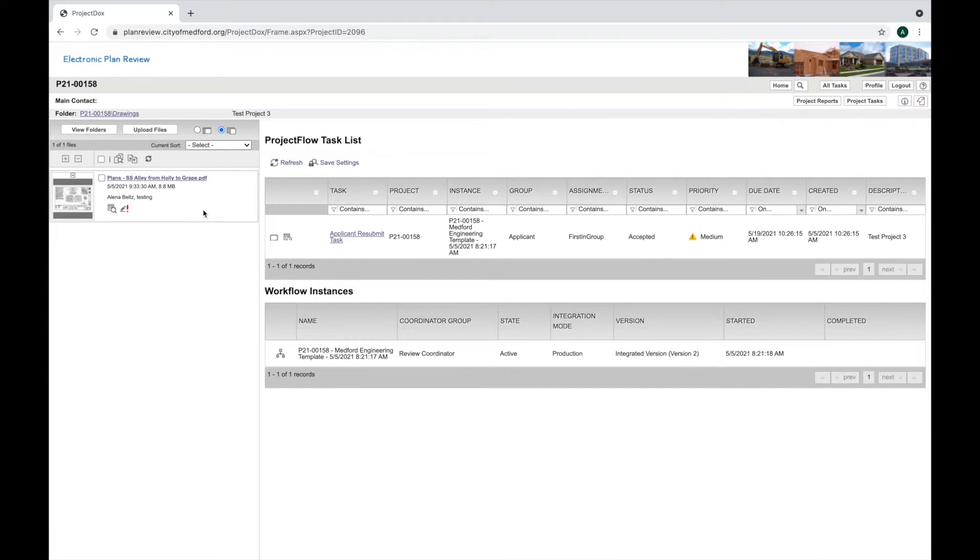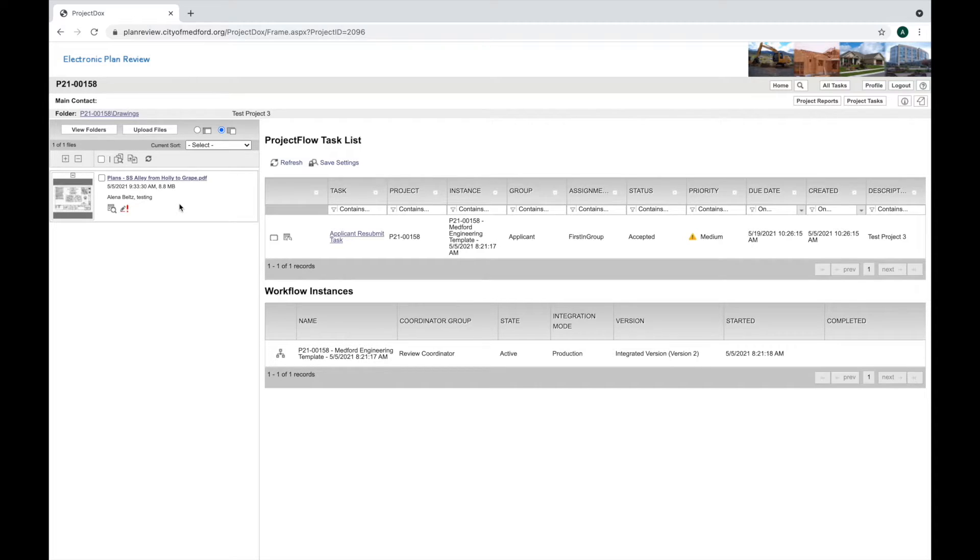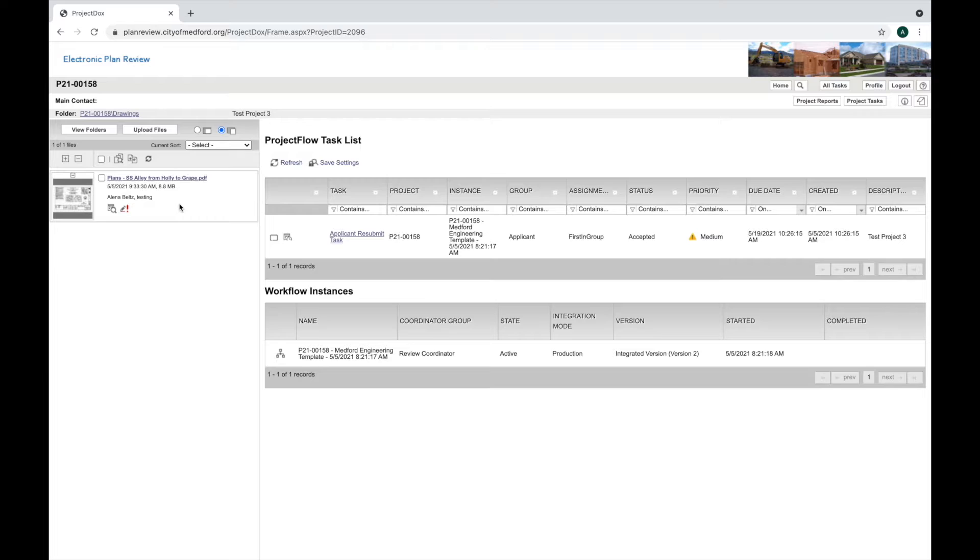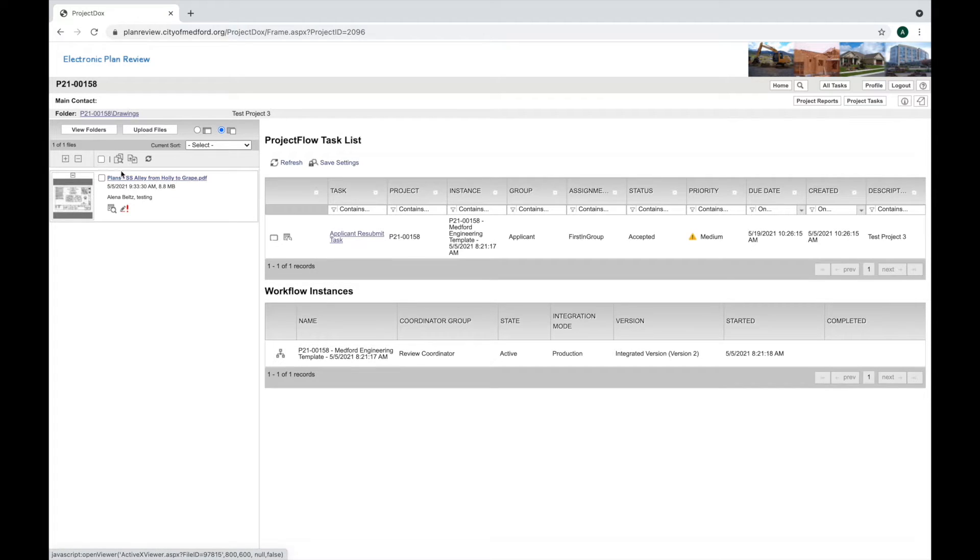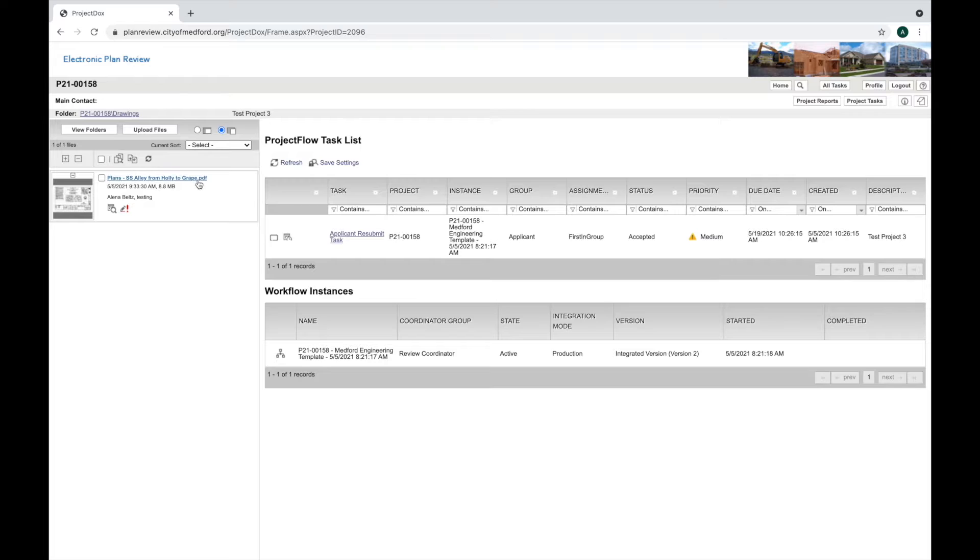You're going to need to upload a revised plan that is going to version over this existing plan. Versioning is an important Project Docs tool. Basically, you're going to have to upload the new plan sets that you've made with the revisions with the exact same name as the existing plan set here. So I suggest preparing your files for upload, making sure they have exactly the same name and they don't have any other dates or other text.